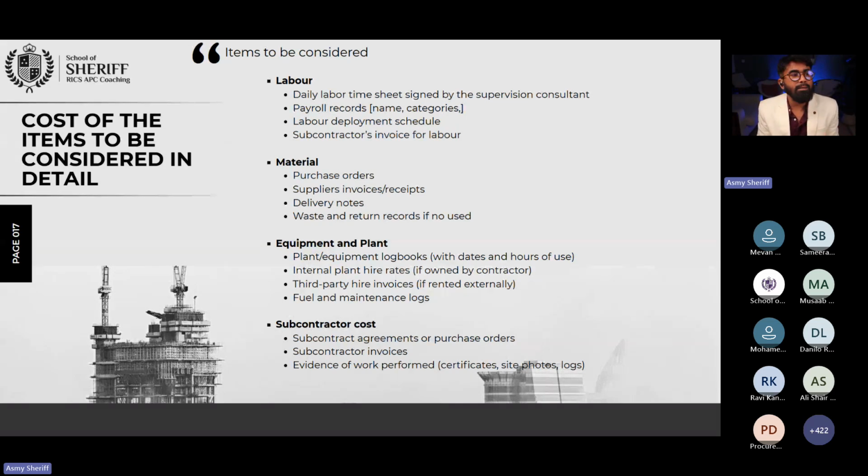The contractor will come and tell, all right, I'm doing so and so thing. You know that when our people work, we pay the money for your labor. We paid your people to come and work 8 hours. Within that 8 hours, they did some work. It did not impact our progress and everything. They're supposed to monitor 1 square kilometer. They monitored 1.2 square kilometers. It's okay, same preliminaries. You did not bring additional people. If you brought additional people, give us the timesheet. We will give you the money.